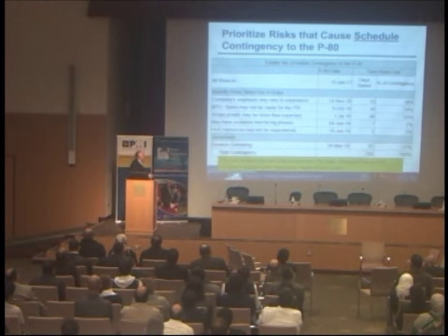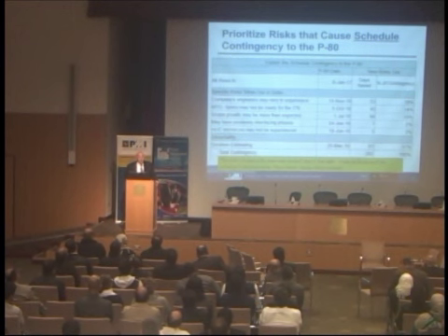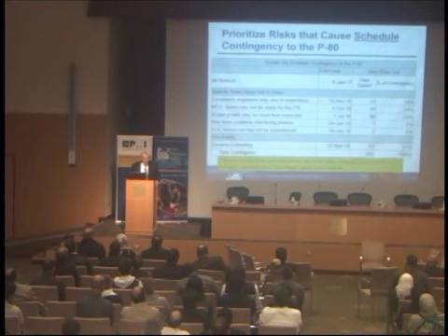You take the risk tornado diagram as an indicator of what the top 3 or 4 or 5 risks might be, and then you try them one at a time. And what do I mean by try them? You make the probability 0 for one of the risks.